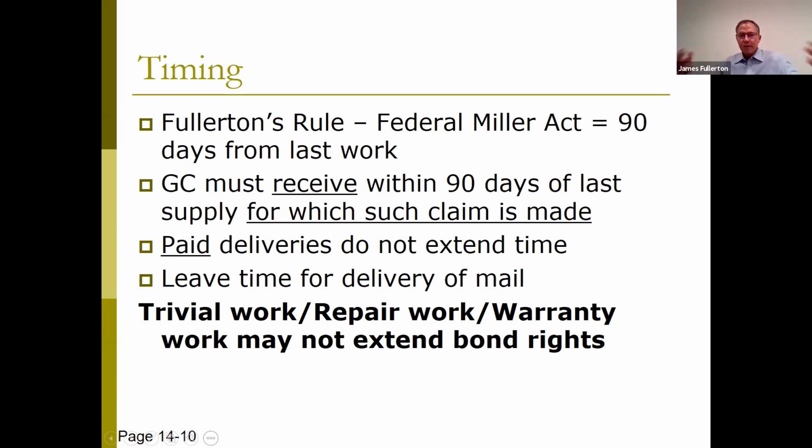it's just something you haven't done before, but it's clearly in your contract. Even if it's pretty small, it probably extends your bond rights. But repair work and warranty work, if it's work that was there once, but it got damaged somehow, or you did install it, but you made a mistake in the way you installed it, and you have to fix it under warranties, it will not extend your Miller Act bond rights.